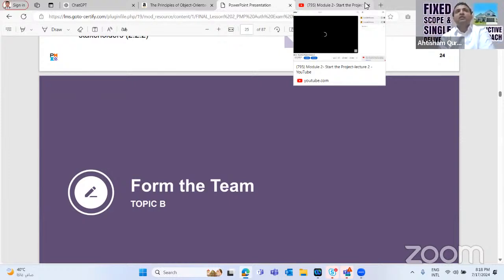And we learned about the engagement matrix, that in order to identify the current engagement level and the desired engagement level, we plot the stakeholders in a matrix. One by one, we assess each stakeholder towards the project.